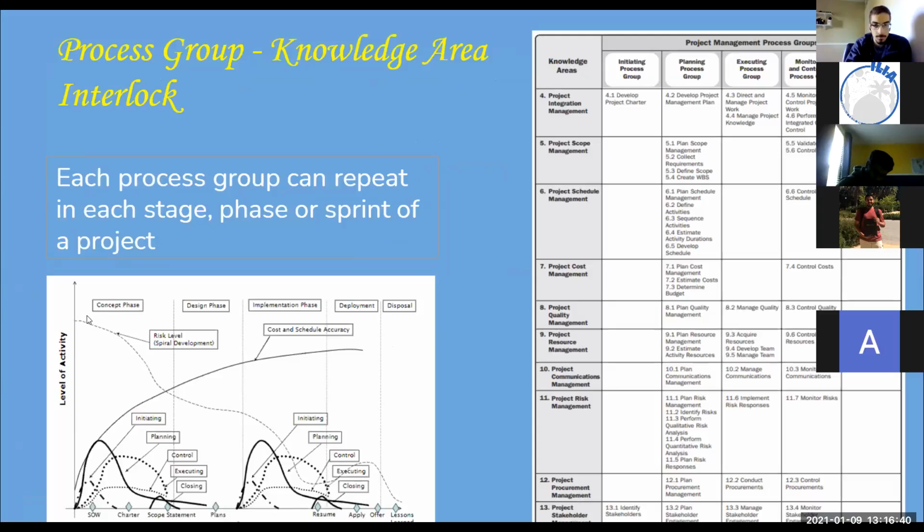So if you're starting off your project completely new, you're going to need a charter, right? Which is this one here, the initiating phase. And you will do that in the concept phase. It's unlikely that you would do another charter for these other phases.